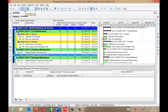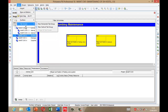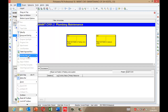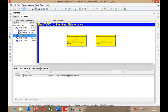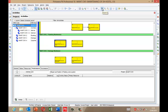Another option is using the network path by clicking the Activity Network icon, or go to View and expand, then you see the activity network and click on it. You click the project folder to display all activities you want to view and link as predecessor and successor. You can use the plus button here to zoom in to get a broader view.